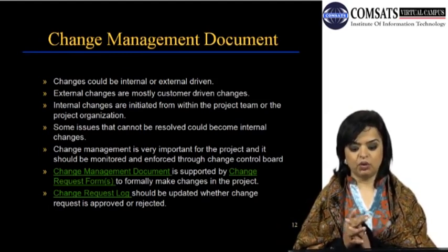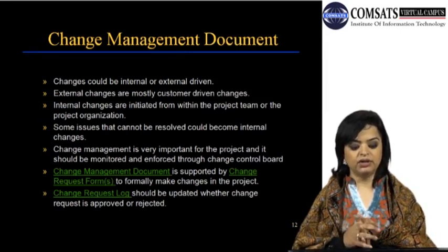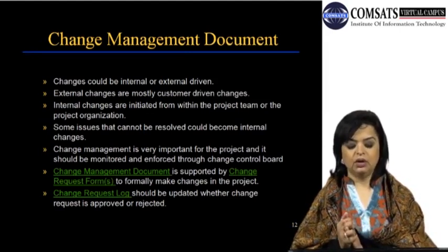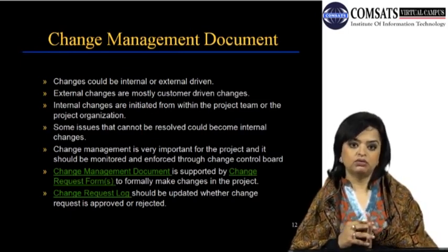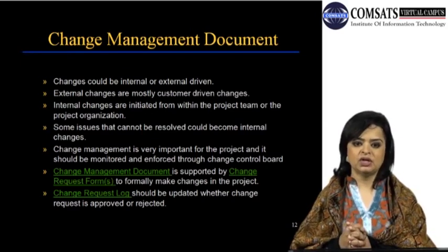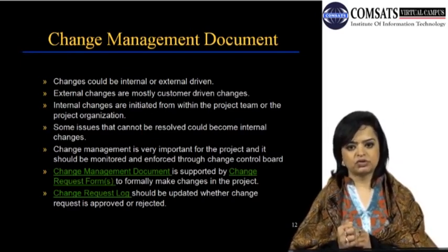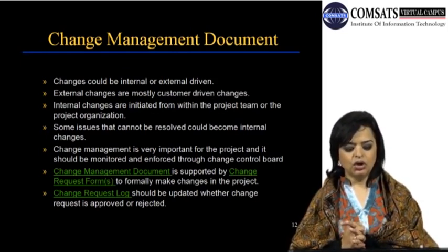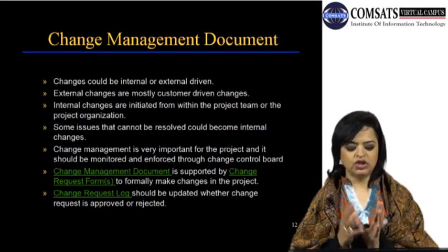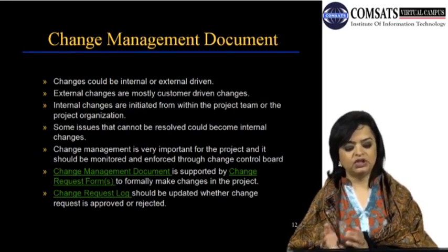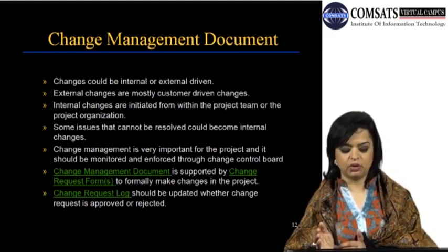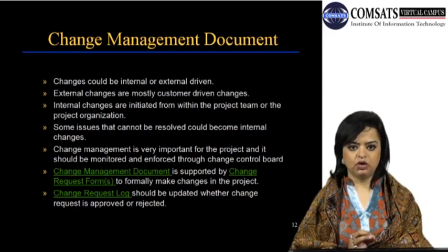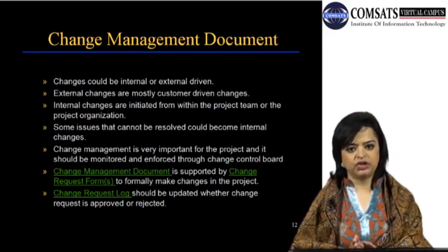Change management is very important for the project, and it should be monitored and enforced through the change control board. The change management process is extremely important for the project. We all understand that there will be changes to the project, no matter how big or how small the project is. There will be multiple changes. The change management document is supported by the change request form to formally make changes in the project. All changes, no matter how big or small, should be put into a document called a change request log. That should be updated whether the change request is approved or rejected.